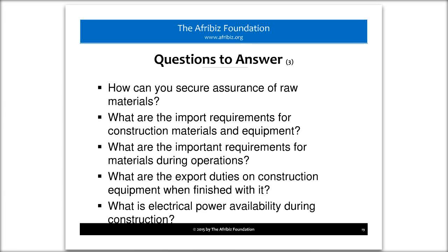The other thing that you want to know, it's not really just about the duties, but you want to know the process. Some port operations can take a long time to get things through it. You need to understand what you need to do, because if something happens, if there's a major piece, even if it's under warranty, and, God forbid, there's a fire in your plant or whatever, and you need to replace equipment, you need to know how do we handle that?